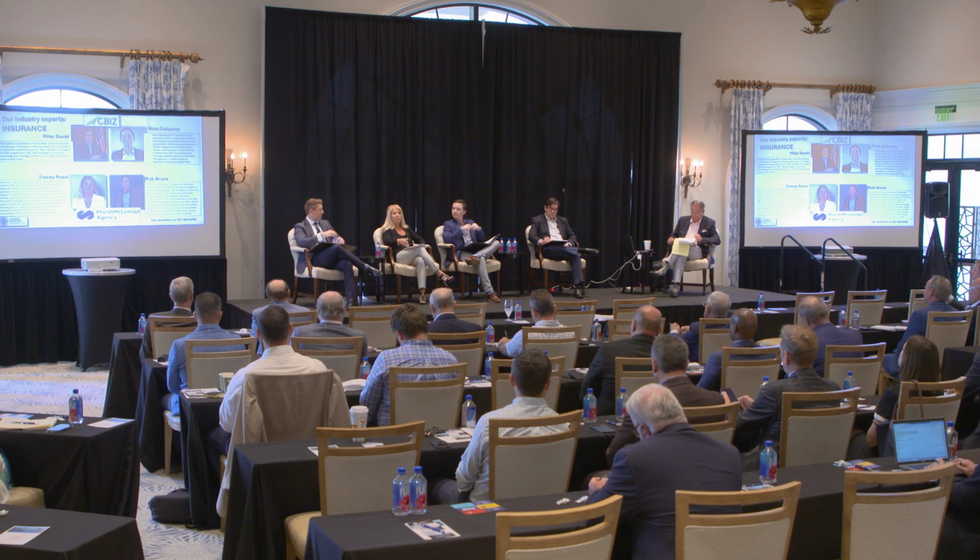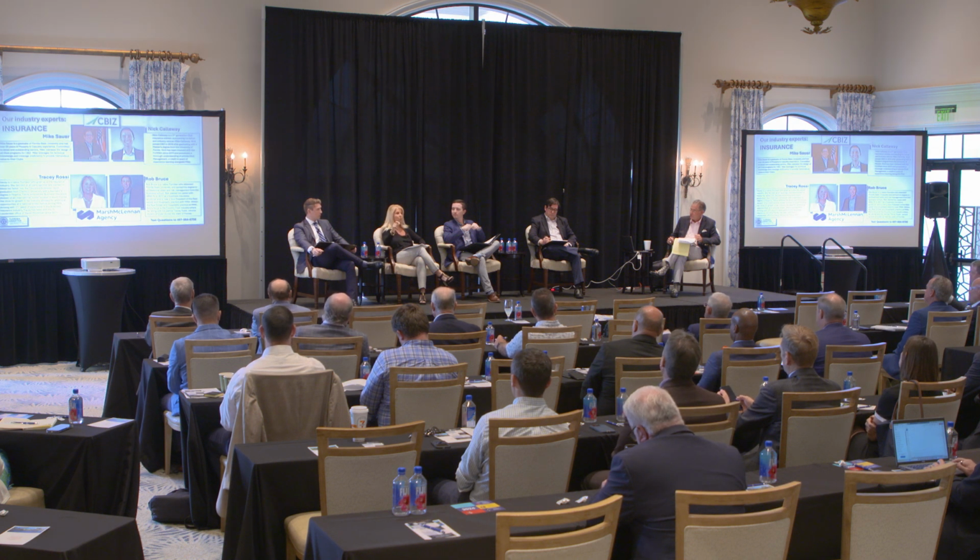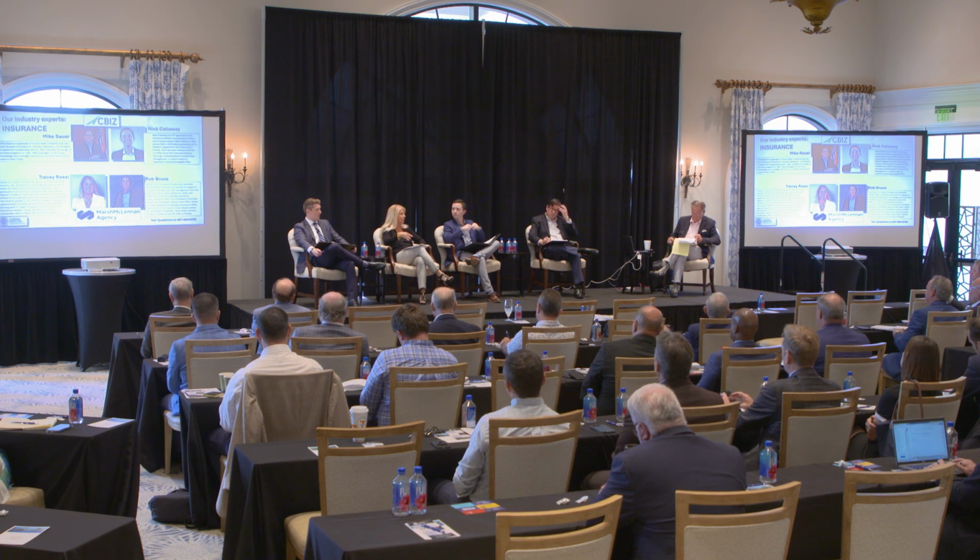We have the discussion. So during your process, we are going to build whatever it may be, fitness center, new clubhouse, renovation. What do you think it will look like budget-wise in 18 months? We can't guarantee what it'll be if there's an E-in, but we're usually pretty good. Again, both of our firms do so many clubs that we can benchmark an idea of what you need to budget. So depending on the risk tolerance of the club, then we can discuss the different tools to either purchase the deductible down with a buyback or just go to different carriers for those reasons.